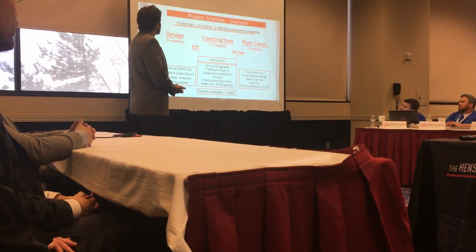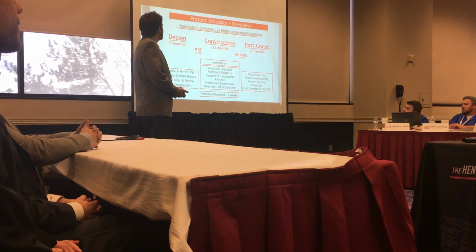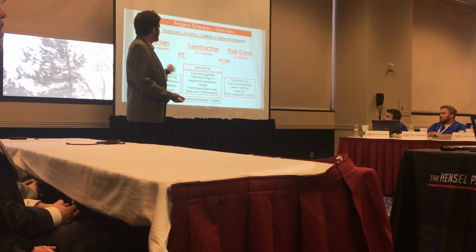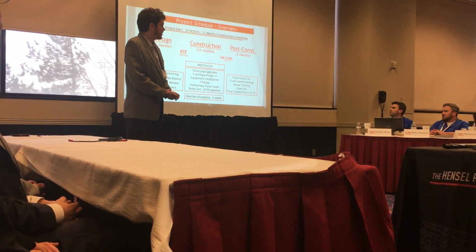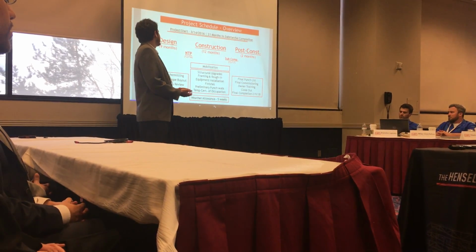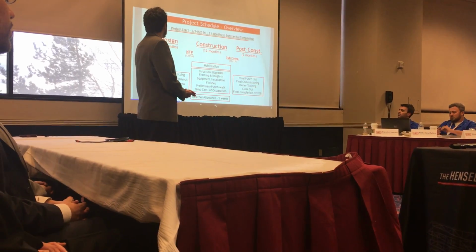We started the project March 14th of 2016. This gives us 21 months total to get to our substantial completion for the project. We have split this project up into 3 phases. The first phase is the design phase. We allow that for 9 months. Then we go into the construction phase for 12 months. Finally, the post-construction phase for 2 months.